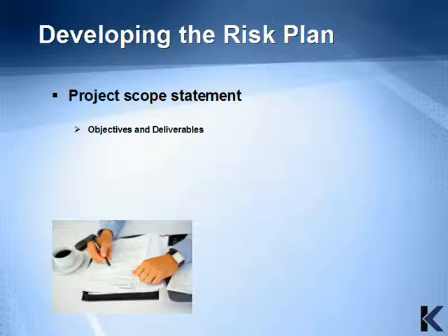You should also review the project scope statement, specifically the objectives and deliverables, because these should be the first clues as to what risks the project might be facing.